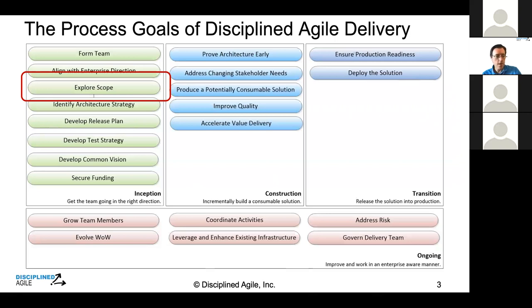In fact, this is one of the advantages of Agile over traditional, where in the past, if it wasn't in the scope document, then project managers tended to say, go away, don't talk to me about this, it's out of scope. It might have been a brilliant idea for some release someday. In the new world, we don't say go away, I don't care. We say we can't put it into this release, add it to the bottom of the backlog, and it will get prioritized for the next release.